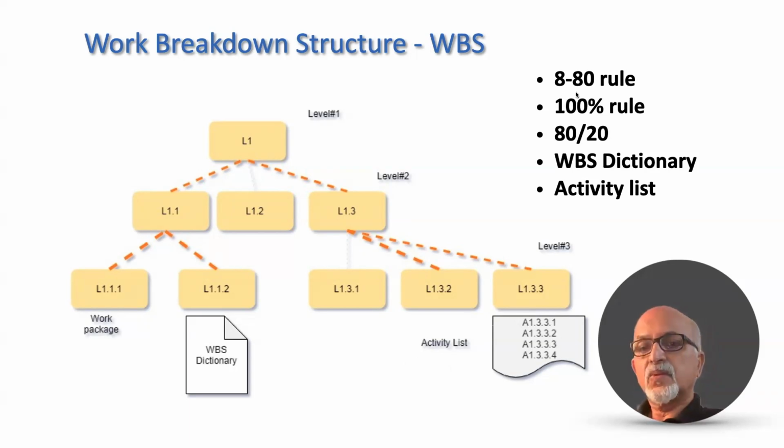An 8/80 rule suggests that work packages should be between 8 hours and 80 hours of work. So for a small project, the work packages should be towards that 8-hour chunk, whereas for large projects, work packages can be towards 80-hour chunks of work. We call it the 8/80 rule.